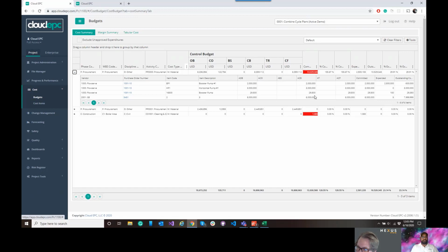the accounting system is the book of record, and we're not going to want to reject any of those transactions. We'd rather see that those commitment values are higher than what's in the budget and go investigate why and go solve for it, either through a trend or a change order or a shift.